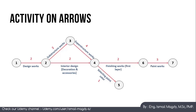After substructure works comes superstructure works, which will take four months. Activity four-to-six can only start after both activities three-to-four and two-to-four are finalized, because you cannot start finishing works unless the full structure and interior design are complete. Substructure and superstructure works together consume six months, while interior design only takes two months — so interior design is not a critical activity and could be delayed up to four months without affecting the overall schedule.